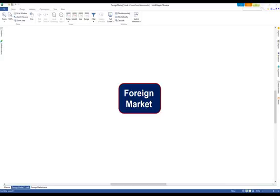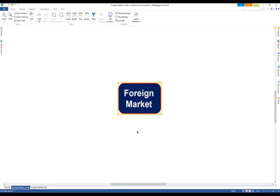Let's say you are researching a potential foreign market for a nutrient supplement company. First, you would set a goal - in this case, a thorough research of a potential foreign market. Then your next step would be to come up with major categories or steps in achieving that goal. Perhaps you come up with six major categories that come to mind.